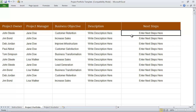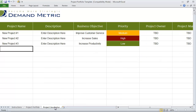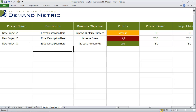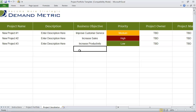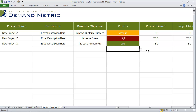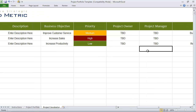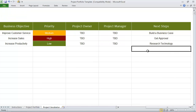In addition to managing your existing project portfolio, you can also use the project incubator tab to keep track of new project ideas that flow forward. We've provided you with space to outline a project name, provide a short description, indicate the key business objective, identify the priority level, allocate ownership and a project manager, and also to discuss next steps.